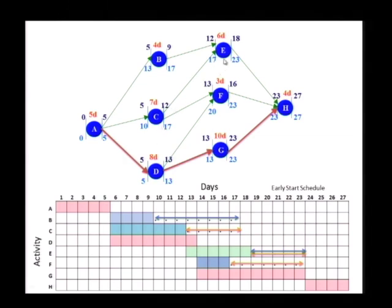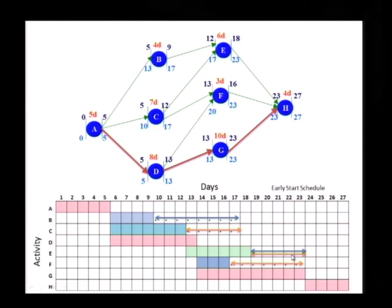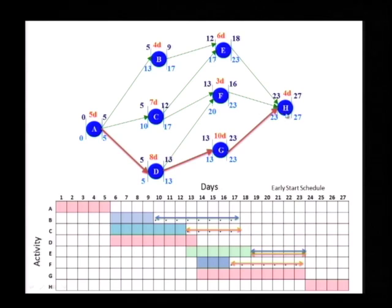D does not have float. Now we go to E. Here is E. When I am moving E for total float and free float, I can move E all the way — five days, that is my total float. Free float is also the same, because it does not affect anything. It is converging to a critical activity and I can move it all the way to 23 without affecting H.